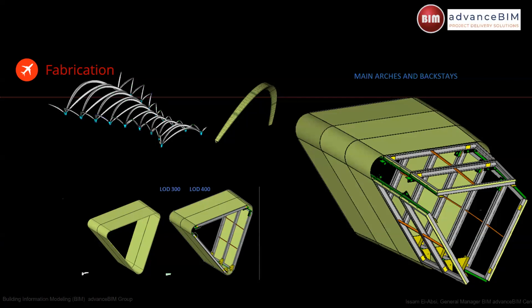The supplier or the manufacturer came to us saying that if he wants to finish this, he needs 2 years. In the construction schedule, only 6 months were allowed to finish the whole manufacturing process, not the installation, only the manufacturing. So we created a complete solution from the 3D model, from BIM, and we created an application that managed to reduce the time that the fabricator wanted from 2 years to 3 months. And we managed to finish this process 3 months earlier than expected.